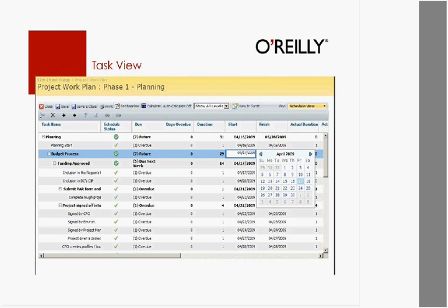So similarly, I can have all the financial information here, what's going on with the project, to a lower level where if I want to go to the task level, I can certainly do this. And notice that for some of you who've used Microsoft Project, this looks very similar. We used EPM Live's tool called Project Publisher, which allowed me to synchronize Microsoft Project and SharePoint. Once that's done, any individual involved in the project, especially in specific tasks, can come in and define where they're at, what the planned start was, what the actual start was, and so on. So I can drill down to this lower level detail.